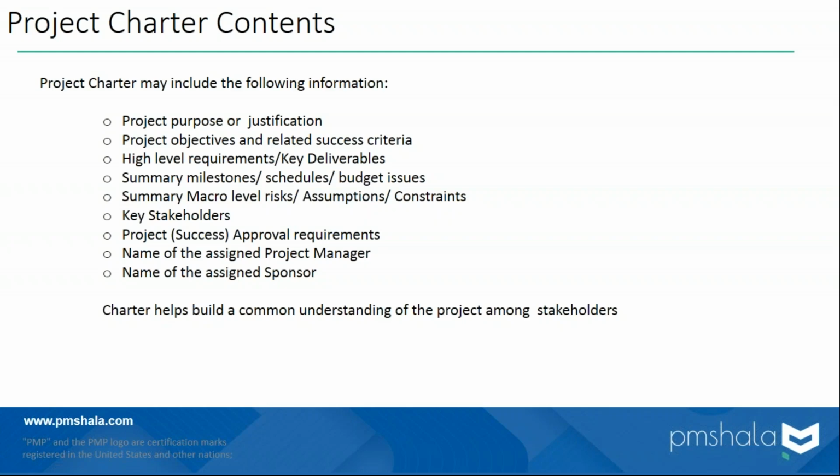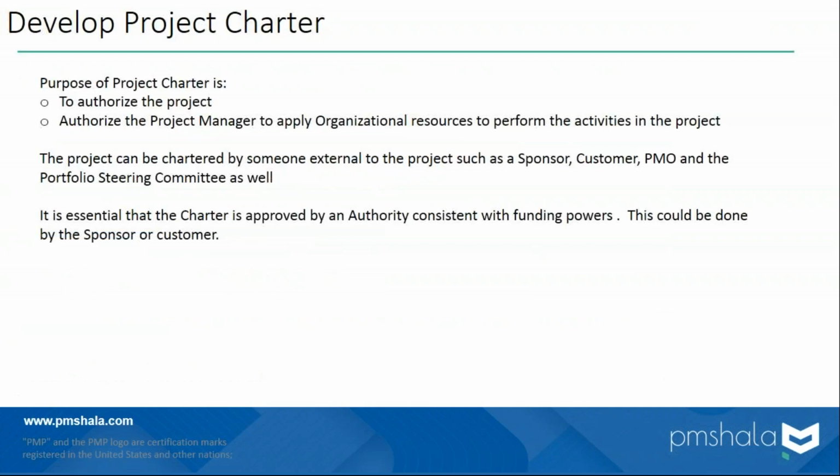Next thing, now let's understand what is the purpose of the project charter. $1 million question. And this would be asked in the exam for sure. It's written here. These are the two purposes of the charter. One, to authorize the project. Look at it this way. Once the sponsor approves and signs off the charter, that means the project is sanctioned. The project is authorized. It can kickstart, begin. This is what I mean by authorize the project. So that's purpose number one. In other words, without the charter signed, the project doesn't exist. It cannot be executed.